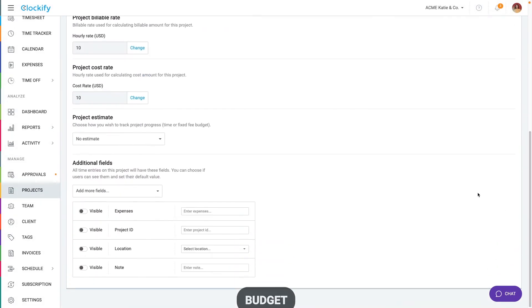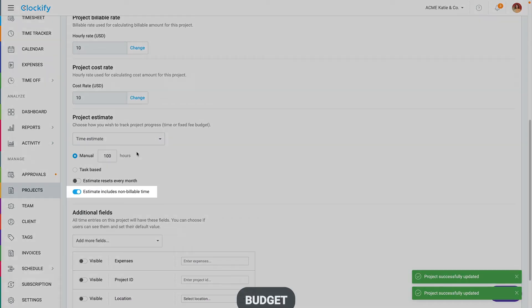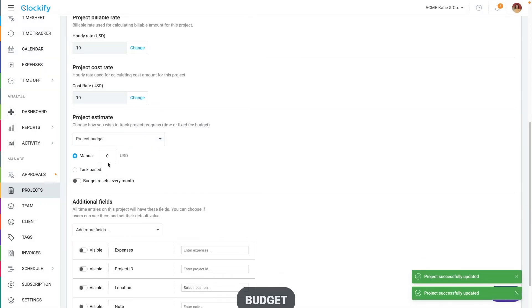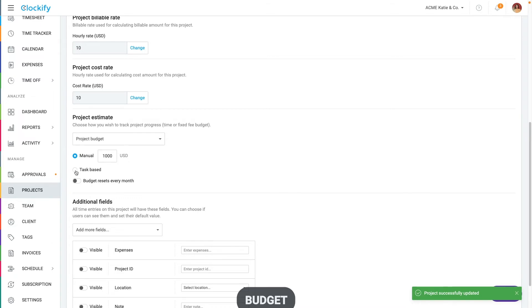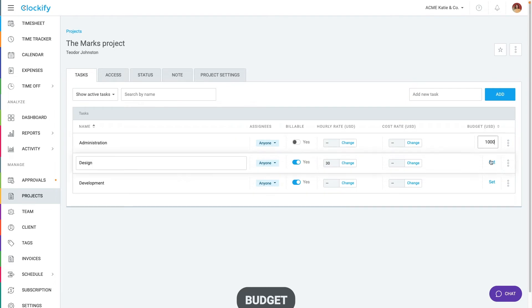You can set a time estimate like 100 hours in case you sell clients blocks of billable time and choose whether non-billable time is counted. If you have fixed project rates, you can set budget estimate like $1,000 for the whole project. You can set an estimate for the whole project or choose task based estimate and then go to the task tab and set an estimate for each task individually.